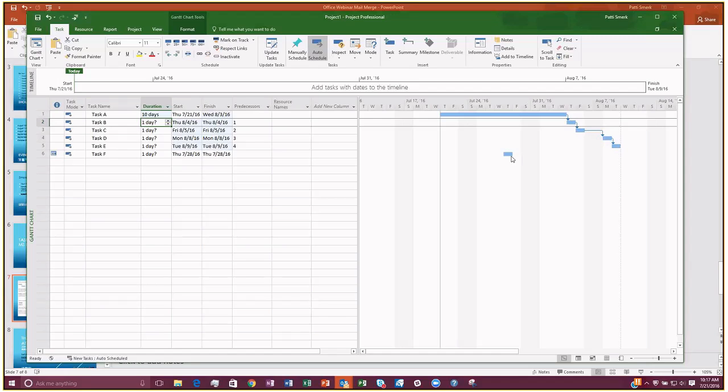This is a case where you really have to determine whether the task is dependent on another task or if it's dependent on a specific date. If it's a specific date, then yes, absolutely type in the start date. Maybe it's dependent on you hiring a contractor and they can't start until a certain day. If it's very date specific, then by all means enter in a start date. If it's truly dependent on the task before it, then you'll want to link it, because if that task moves or changes throughout the project, then everything else will reschedule.